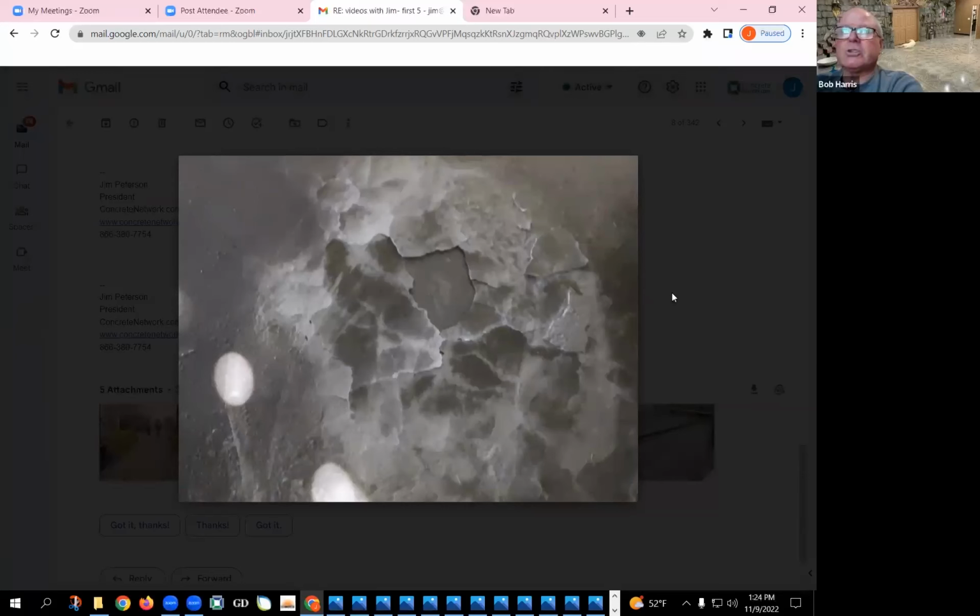And on a project that they had projected 8 days to finish, this 30,000 square foot slab ended up taking close to a month because they had to grind down through all of the delamination, which ended up giving them an exposed aggregate floor. The end result was nice. The client was satisfied; they didn't have to remove and replace concrete, but it did dramatically impact the duration schedule of the project, plus the amount of labor. It's a very laborious process.